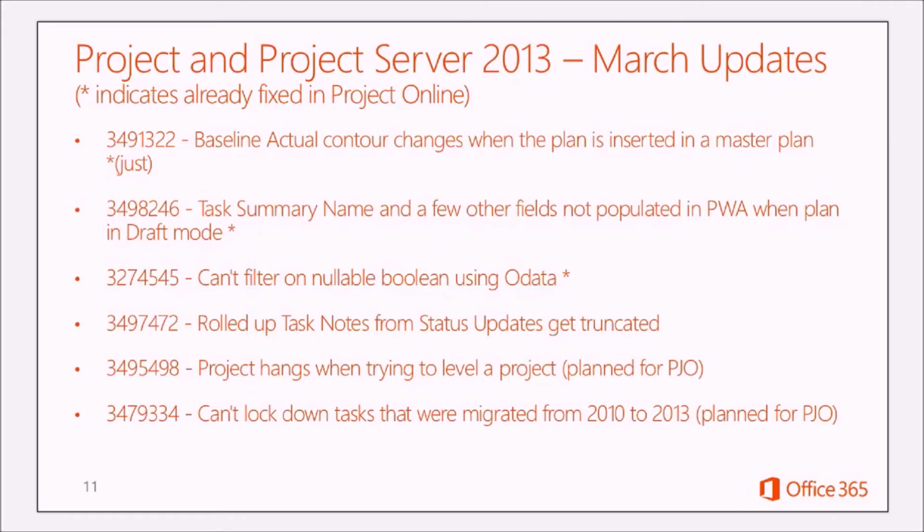There were some conditions under which you would try to level a project, and this was most common when you're leveling on a weekly basis, and a little bit on a daily basis as well. There were some conditions within the leveling algorithm, which tries to merge towards a common point to see whether or not it's actually making progress. As the leveling works, it does that by adding delay to assignments, delay to tasks. It just keeps on moving things out.